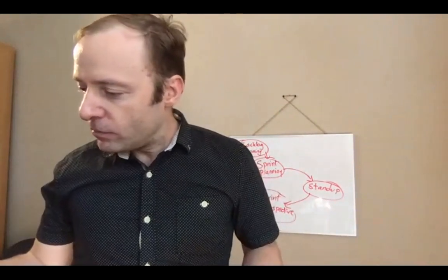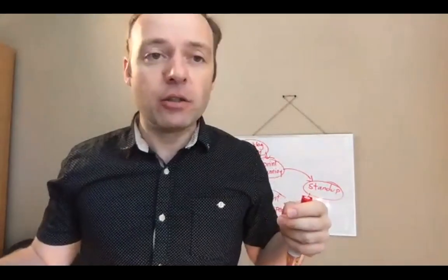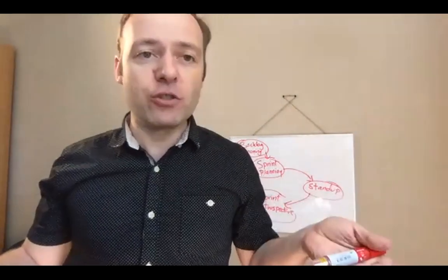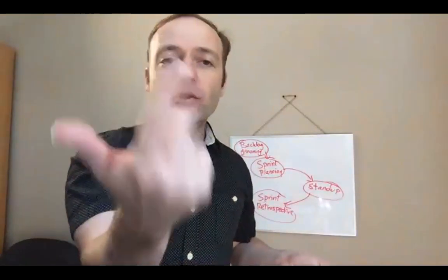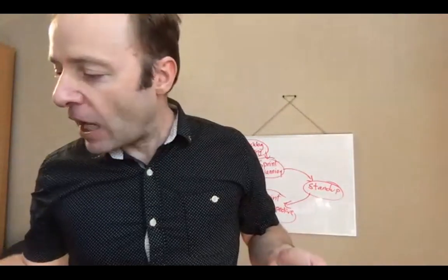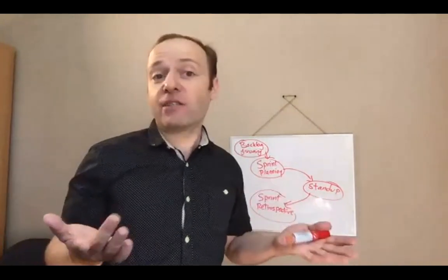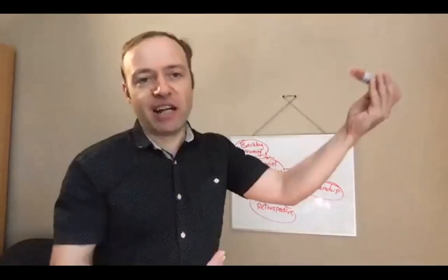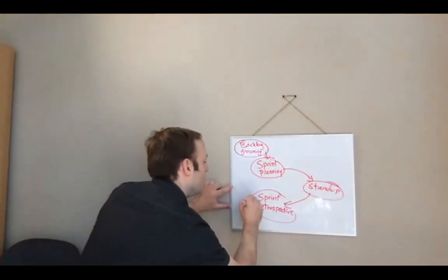You want to reduce lead time, so reduce the time between starting a task and finishing a task. You also want to make the work of everyone visible in the task board. So you want the tickets to be assigned to someone, to be in the right column. You want people to comment on the items when they move them from one column to another. And you want to reduce the amount of work in progress. So each developer should only do like one task, maybe two at a time, but not like five, because everyone will wait for them to get done before they can do their work.